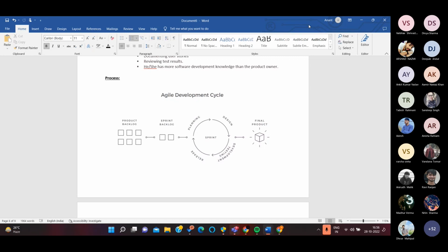We often come across the word user stories. So user stories are formed, and when these user stories are formed, there is a session we call sprint planning or sprint grooming, where everything is made clear to the developers about what needs to be done in that particular story. And then effort estimation comes into play.